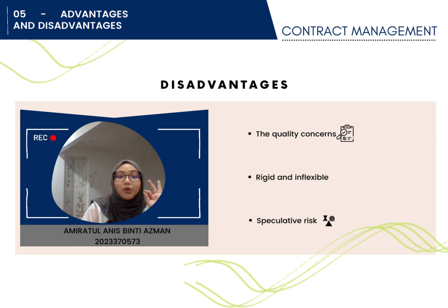It should be noted that the design and build procurement method frequently involves a fixed price contract, which is one of the factors that contributed to the inflexibility.